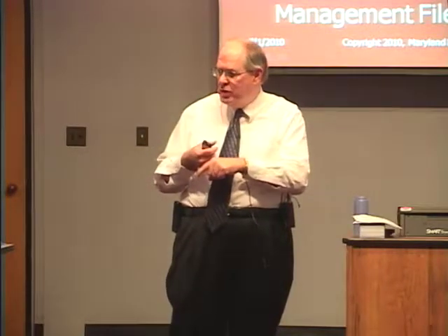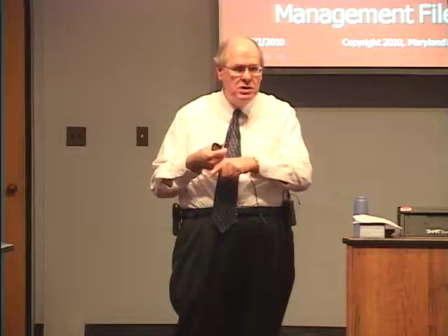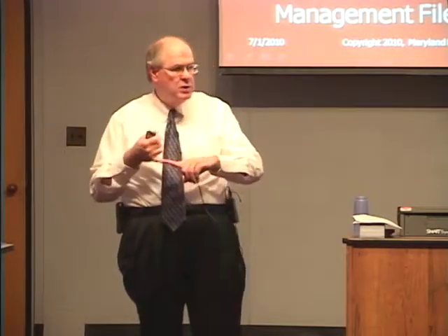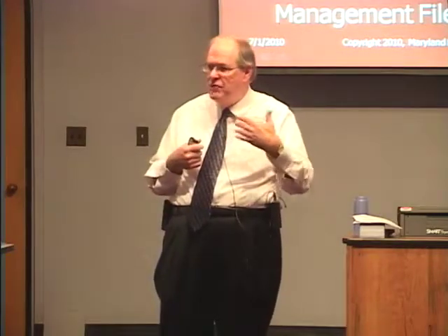Even if it's not an evaluated procurement, you can require this after the award of a contract: that the vendor has to give you a contract management plan. So if it's a sealed bid procurement where it's not an evaluative factor, you can still say within X days of the start of the contract, typically before, sometimes after, you will want a contract management plan from the vendor that you will have the ability to review, approve, disapprove, or require them to change, all from the standpoint of knowing whether the vendor is applying the proper resources to manage.